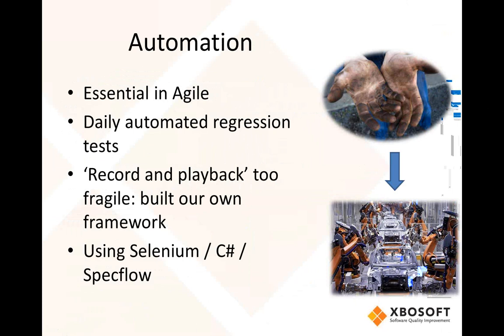I say usually because we don't do it in every case. We use a risk analysis to determine which parts of the product might have the highest impact, either technical risk or business risk. Those that have the highest impacts, we definitely put in an automatic regression test, and the others we discuss with the client.